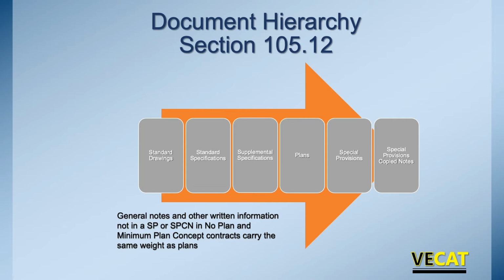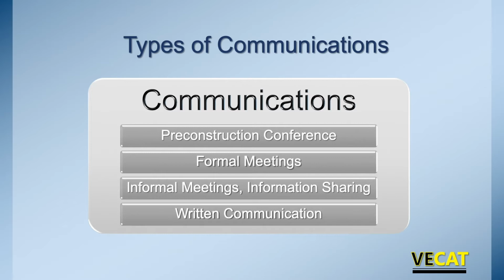If you're out in the field, many other things come into play. On projects, when we talk about communications, cold in place recycling job, and even some of our cold plant recycling jobs, we're doing pre-construction conferences. So we're getting together before the project starts, sitting down with the VDOT personnel, maybe the consultant personnel, the contractors, some of the subcontractors may be there, and we're going to talk about how the project goes: do we have all the paperwork, do we have the necessary sign-offs, what's the job mix? A lot of things go into that pre-construction conference. Talk about safety and things of that nature.